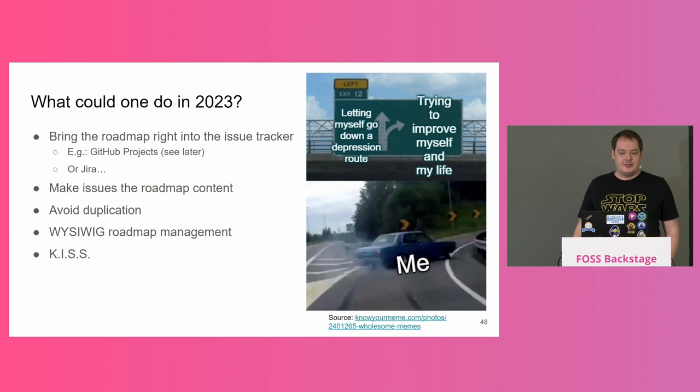A lot of things changed at the moment. And again, my recommendation to you is that if you have an issue tracker, you put the roadmap right there in front of developers and make it super easy to manage. This was our mistake. We chose integration with the website, a lot of our automation, instead of just using, let's say, Jira at that point. We had a clear obstacle because we were migrating from Jira to GitHub at that point. And even by now, this migration is not fully completed.